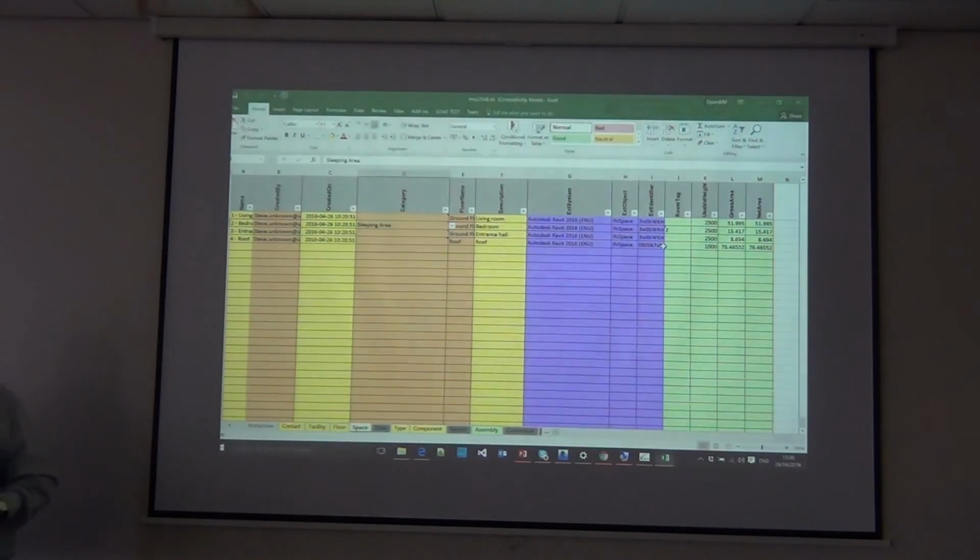So although it's a little bit tedious, it's quite simple. You just got to fill stuff in, really. So presumably you'd do that as part of your design process? Yes, and as you're going along, you input the data into the properties or the property sheets. This is why I said sort the spaces out first, because this is the key thing in Cobie, getting your spaces there. But this is not going to take a long time process of editing all this information inside the design stage phases. It's going to be spread over a long period. It probably isn't in itself a lot of time, but it has to be done all the way through the process.